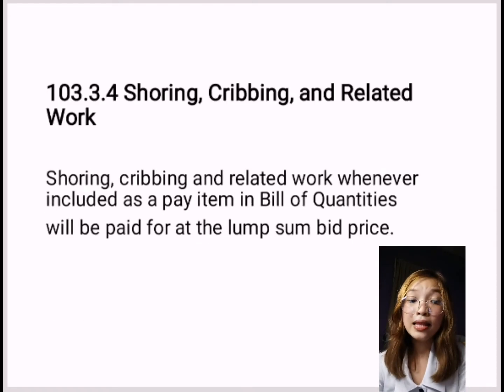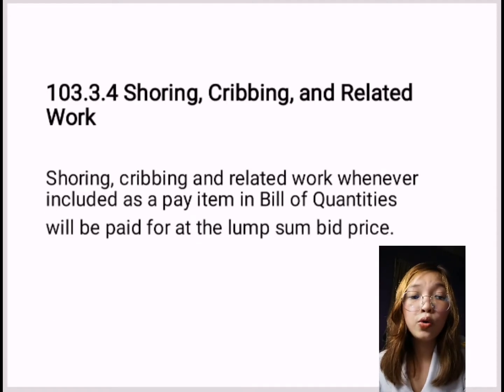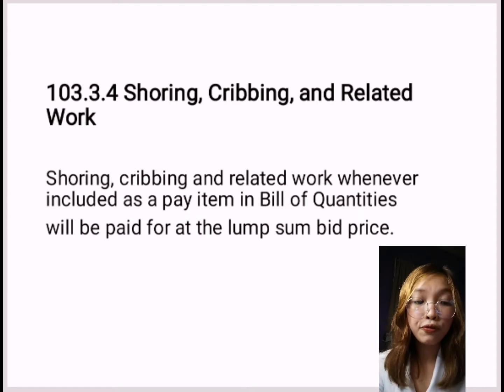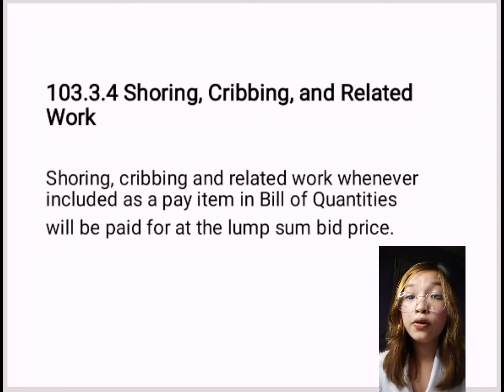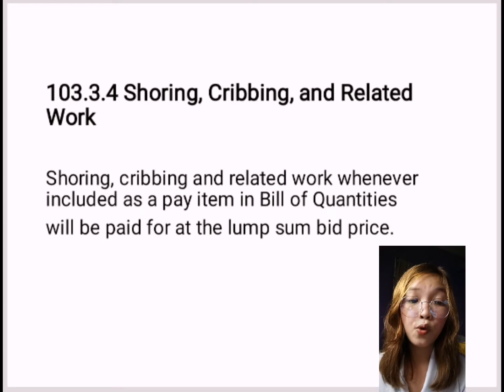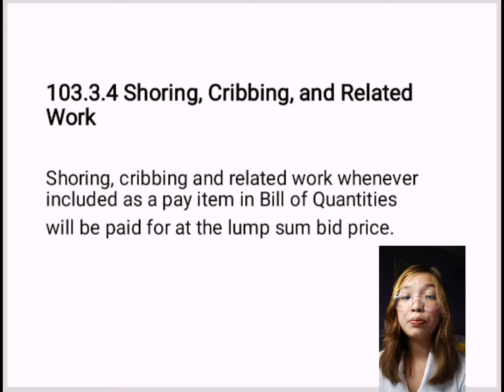So next, let's proceed to item 103.3.4, which is the shoring, cribbing, and related work. So shoring, cribbing, and related work, whenever included as a pay item in bill of quantities, will be paid for at the lump sum bid price.